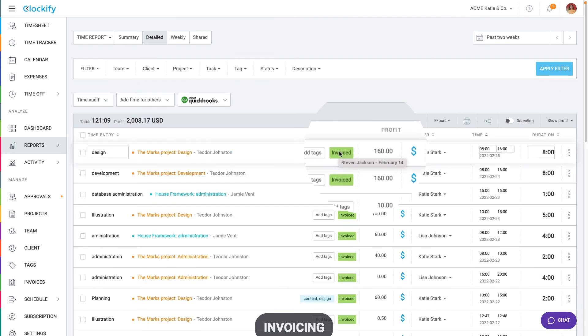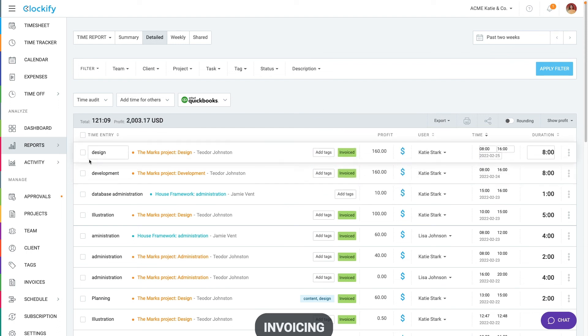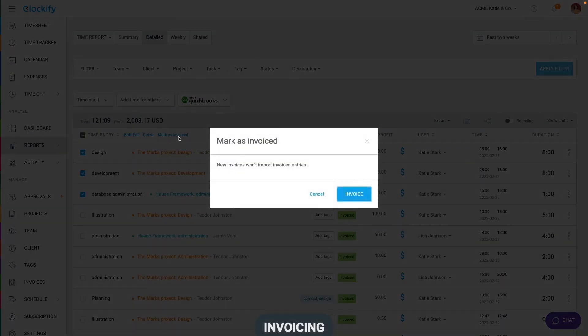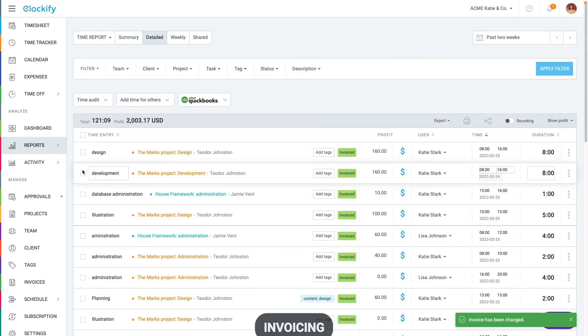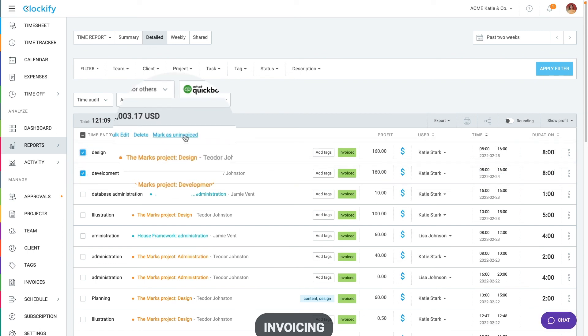When you hover over the invoice tag, you can see where you've invoiced this entry. To manually mark entries as invoiced or uninvoiced, select them via bulk edit and then click on mark as invoiced. If you select just invoiced entries, you'll be able to mark as uninvoiced instead.